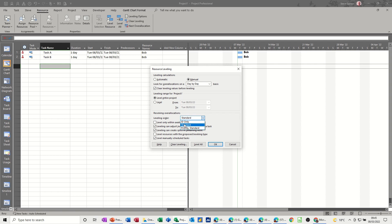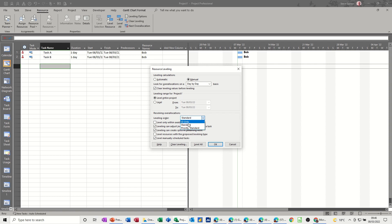basically checks first off the predecessor dependencies, any slack, dates, priorities, which is what we're talking about here if you've changed the priority, and constraints before it decides whether this task should be levelled or not. And then you've got the option at the bottom which says priority and then standard, so it's still doing all those things in standard, but the priority bit of standard is going first. So you're basically giving it a bit more importance by doing that.